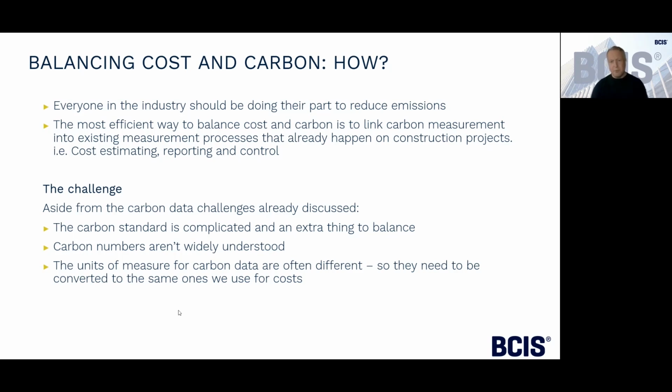The most efficient way to measure and report carbon is to link it to existing measurement processes that happen on construction projects. By this, I mean cost estimating, cost reporting, cost control, i.e. the role that an estimator or a quantity surveyor would be doing on a construction project. We're already measuring for this purpose. We must be reusing that measurement in order to identify carbon numbers as well as cost numbers.